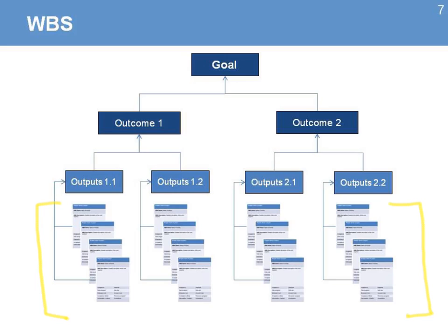Depending again on the level of complexity or risk on your project, the amount of information could be higher or lower. If you know that it's a complex activity that needs a very detailed description, then it could be 1 or 2 pages. If it's something simple that doesn't require a lot of instructions and the person who is going to be assigned that work already understands what it is, then the documentation can be even half a page long. The idea is that you have a description, in a sense the instructions that you need in order to build your project.